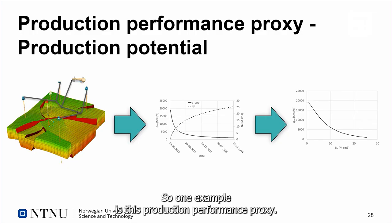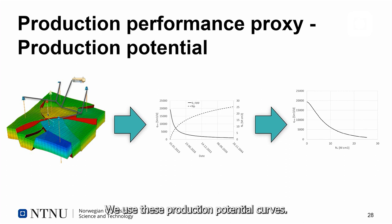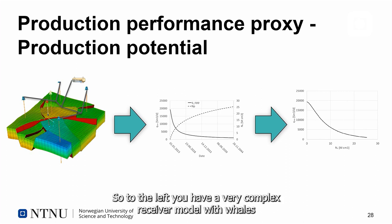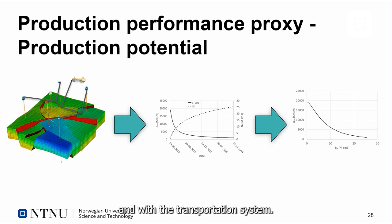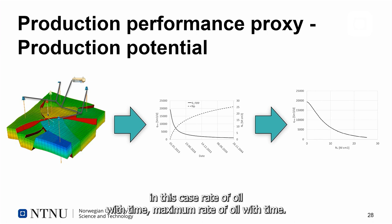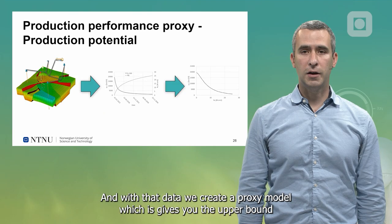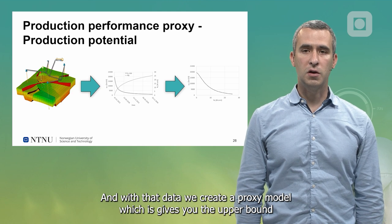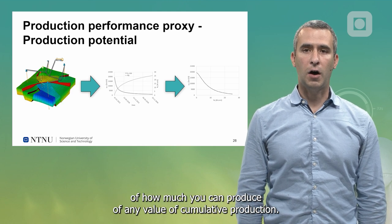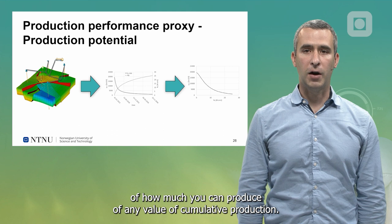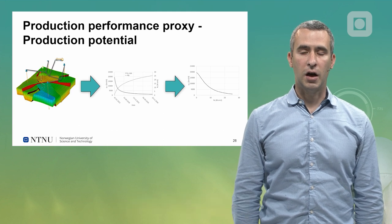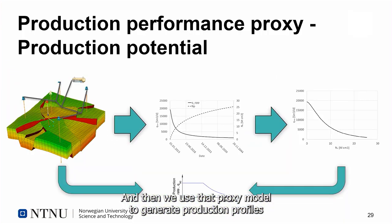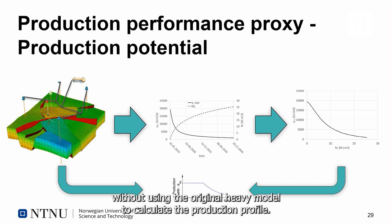One example is this production performance proxy. We use production potential curves. To the left, you have a very complex reservoir model with wells and the transportation system. From there, we generate data. In this case, rate of oil with time, maximum rate of oil with time. With that data, we create a proxy model which gives you the upper bound of how much you can produce at any value of cumulative production.